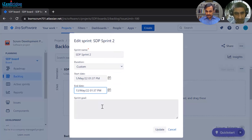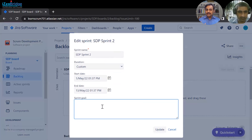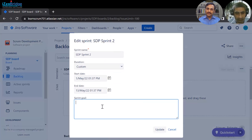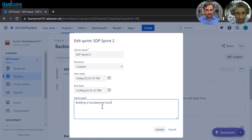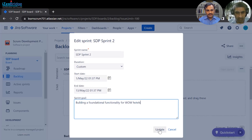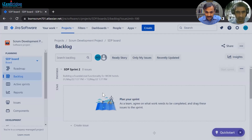You also have the facility to create a sprint goal. It's like starting your sprint planning meeting — you create a sprint and declare what your sprint goal is. Sprint goals are one to three line statements that create a clear idea of what you want to do in a given sprint. For example: 'Building foundational functionality for wovehotels.com.' This is textual information that plays an important role for communication purposes, though from a tool perspective it's just a description. Once done, click 'Update' and your sprint is ready.